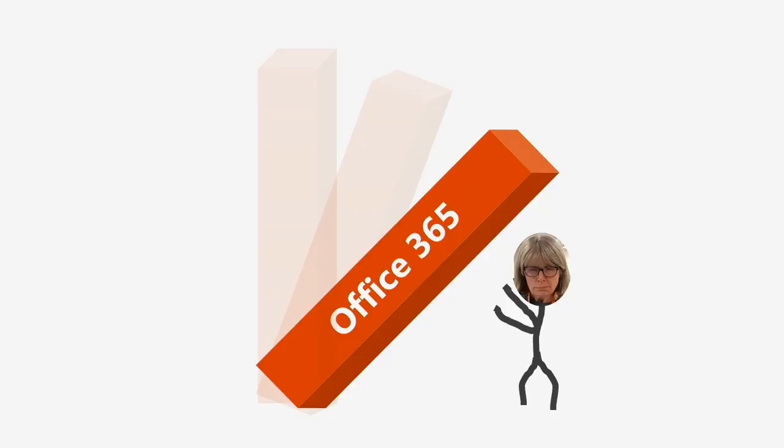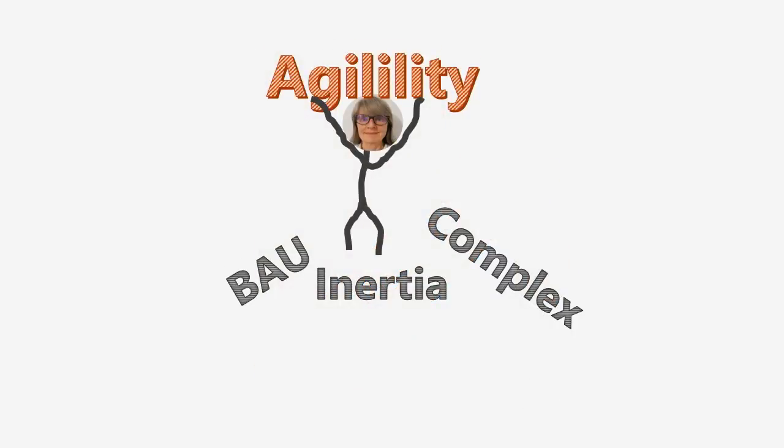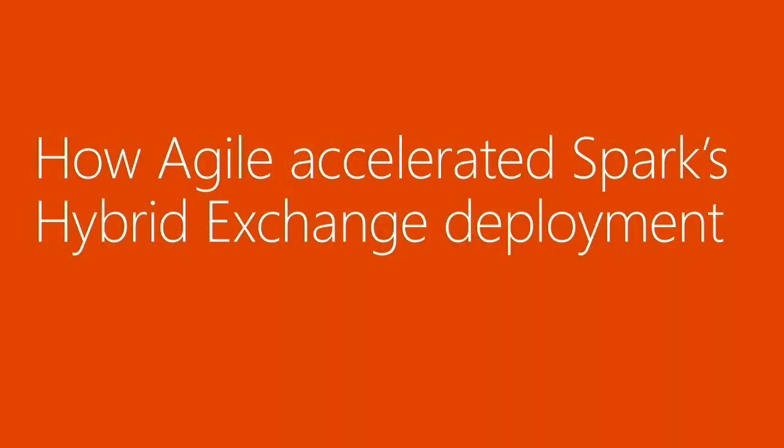But then I looked at actually what he was drawing on the whiteboard. And what he was drawing on the whiteboard was what we needed to do to get those 30 mailboxes in the cloud in 15 days. And I got it. I got the idea of Agile. That was my first lesson in Agile, work in small iterations. And I was up for that challenge. 30 mailboxes in the cloud in 15 days, no worries. So we went from trying to deliver all of those requirements down to the specific requirements that we needed for that iteration. So let's talk about how we actually did that.